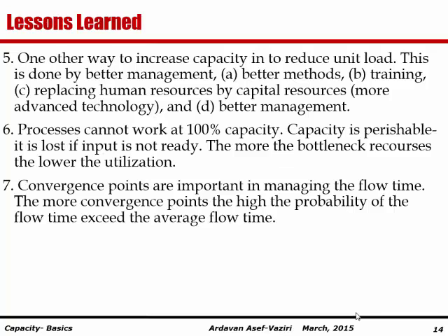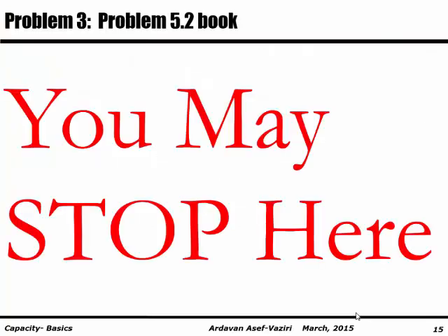Convergence points are important in processes and in projects to manage flow time. The more convergence points, the higher the probability of flow time to exceed the average flow time.